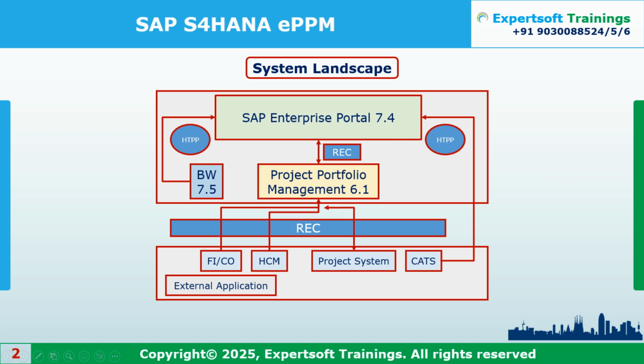Then you come to the BBP phase, or a preparation phase. Under the preparation phase, again you will do thorough testing and everything. Then you submit what budget is required for these projects. Then your stakeholder approves, and you proceed further. That is called a stage gate process. Every stage gate has to be passed, and then you will execute it as the real project. Till that time it is virtual, on paper.